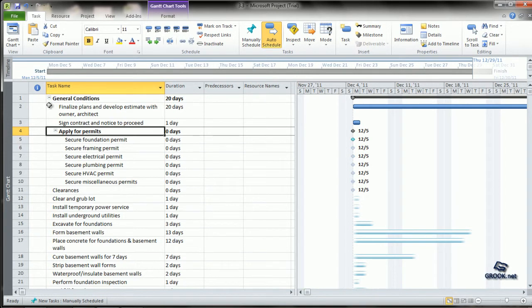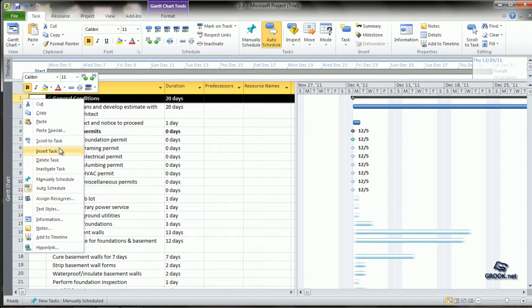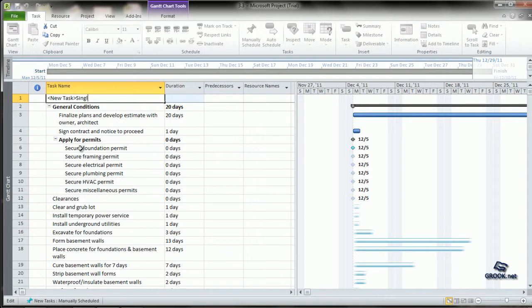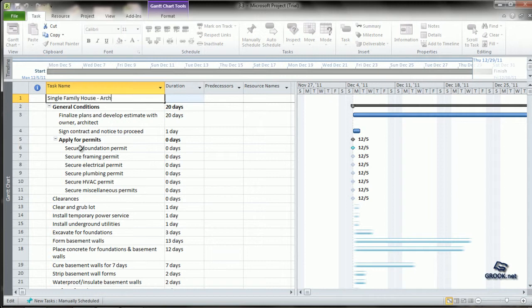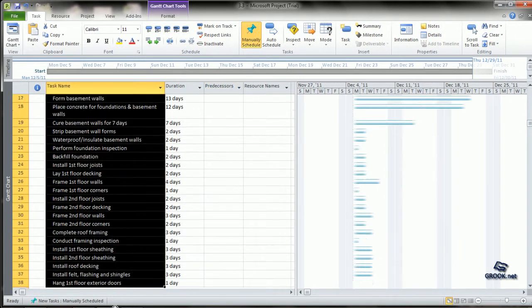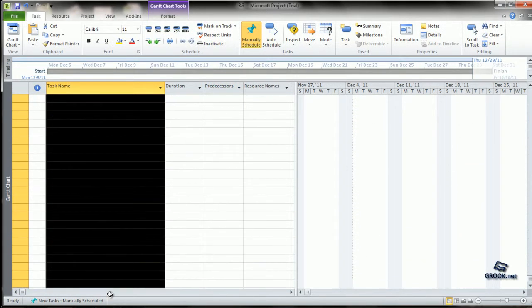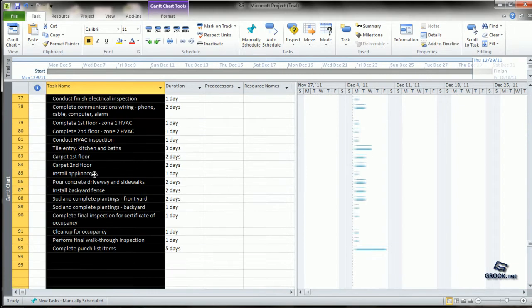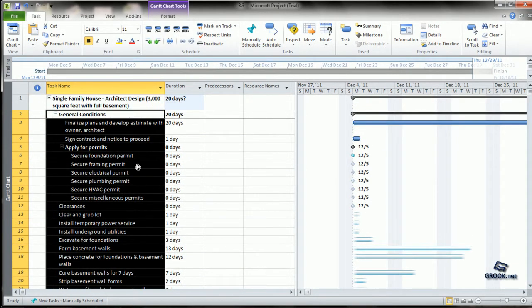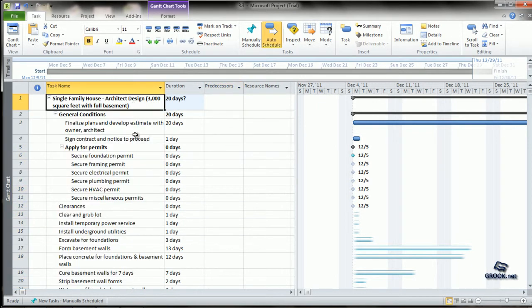You can also use it to enter a major heading for the project. Like you can insert task and give a heading to the project. You can select all the tasks below it and indent them all inside, so this becomes a major heading.